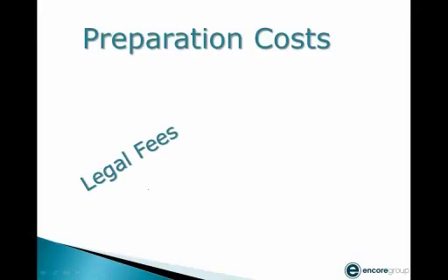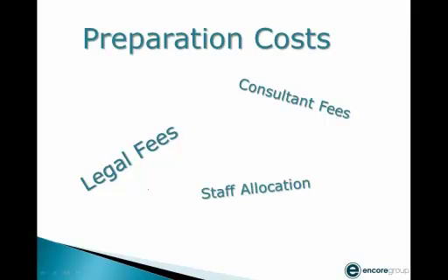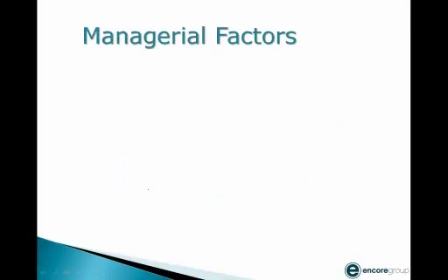Then you want to look at your preparation cost. And both sides have to look at this. Sometimes you're in a dispute over a few $100,000 and you're looking at, wow, how much is it going to cost me to prosecute this claim or to defend against this claim? You've got legal fees in there, and you have consulting fees, and then there's also just the staff allocation. That's probably one of the biggest costs that my clients have that they don't even realize going into a claim scenario: how much of my own internal staff is going to be involved in this.